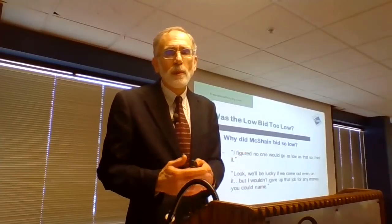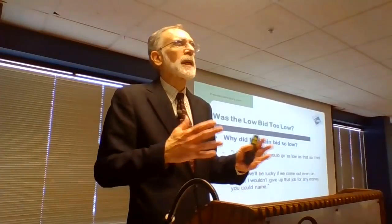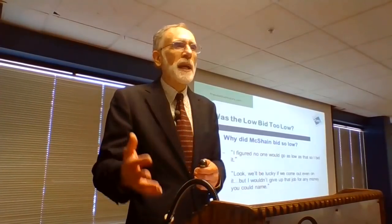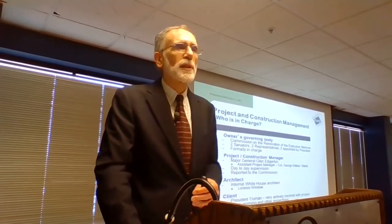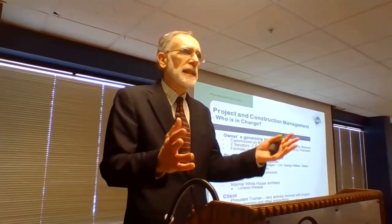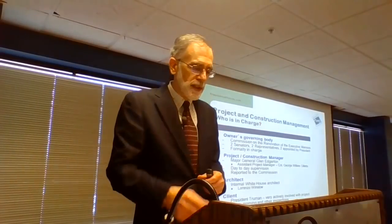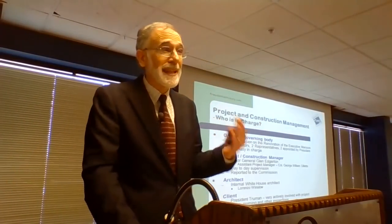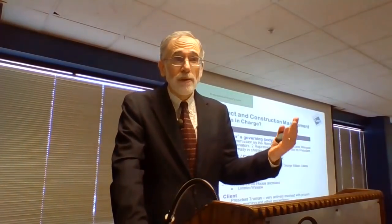So one of the issues that we face when we're managing public construction projects is, what is the organizational structure? What's the construction management, project management structure? So one of the problems with this particular project is there are basically too many cooks in the kitchen. Too many people with decision-making authority. At the highest level, you had the Commission for the Renovation of the Executive Mansion, who was ultimately responsible. They hired a project manager and assistant project manager to deal with the day-to-day issues. And you also had the architect, the White House architect.